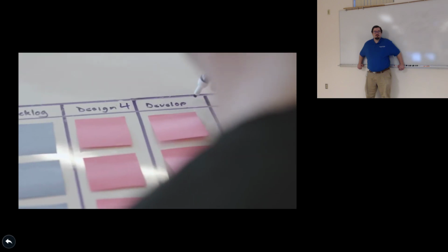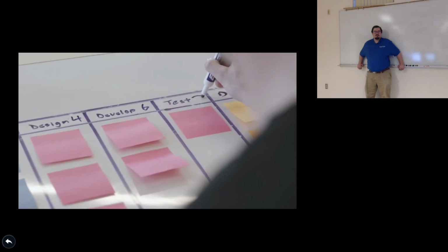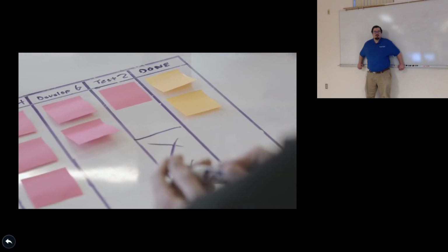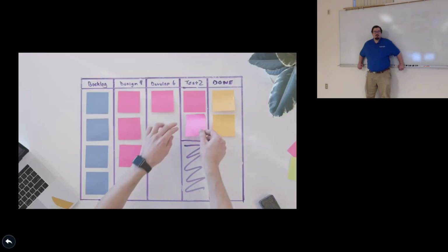The simplest Kanban boards are physical boards where teams divide their workflow into vertical columns. They take a whiteboard or a blackboard and they mark up the board, filling each column with sticky notes. The sticky notes then flow through the workflow to demonstrate progress. The first advantage of a physical board is it's super easy to set up. The second reason that I love physical boards is they're so tangible and fun.